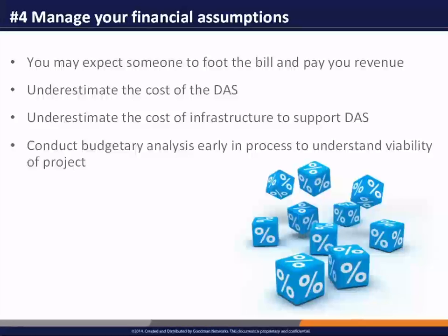And you're going to make a big investment in preparation in an RFP, and the people responding are going to make a big investment in their response. And if you discover early on and do some diligence through a budgetary analysis, it can really cut off a lot of the work that you may do in preparing an RFP or doing some of the back-end stuff that I've talked about in this presentation.